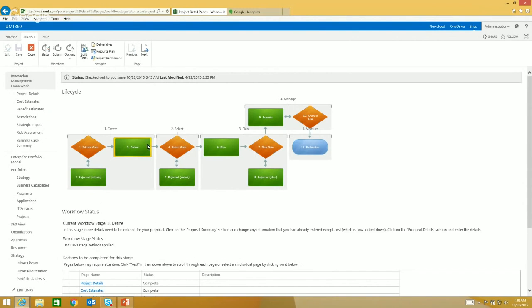The benefit of that is I can start to see the differences in my estimates as I move between those two phases. But once I have actually completed this project, I can circle back and start to generate metrics like estimating accuracy. So I can see how accurate my estimates were based on the first estimate and my second estimate when compared to completed cost or even the forecast cost of the project. Estimating accuracy really provides a good picture of what's going on. How accurate in my organization am I at estimating? In this department, maybe we're plus or minus 30%. At this gate, plus or minus 10%, whatever it may be.